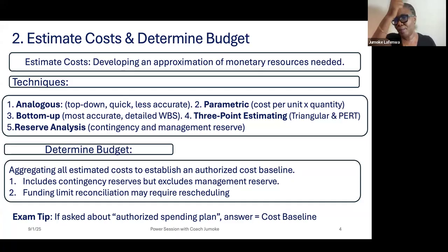reflecting it on the planned value, on your budget. So the 2 rooms that you did should be 20,000, because every month you should have done one room, but you got to the third month and you've done only 2. So it should be 20,000. So your earned value should be 20, right?